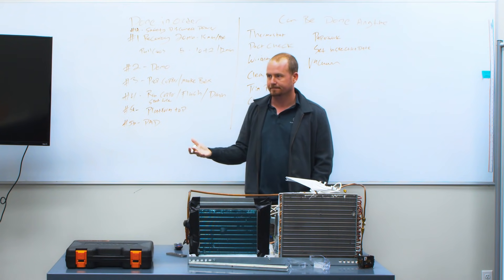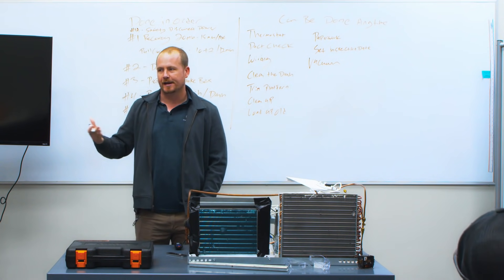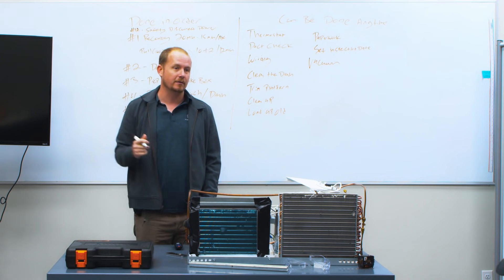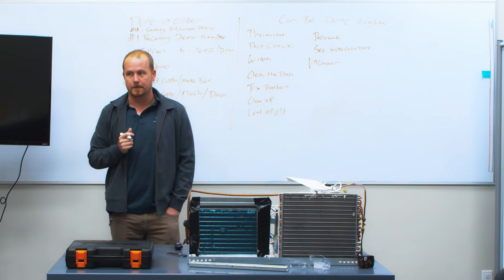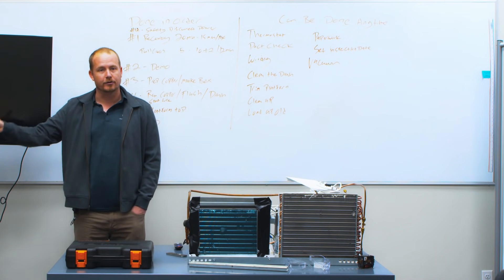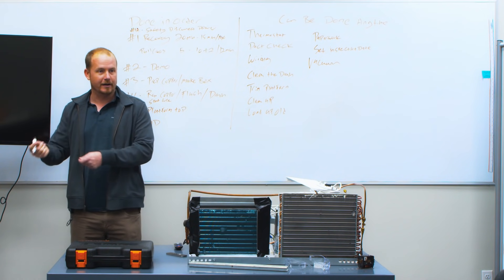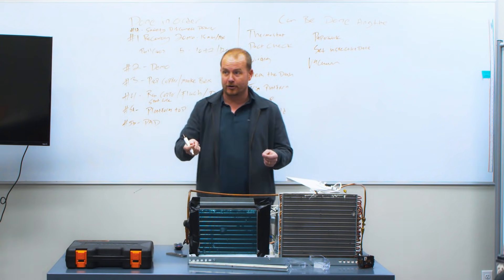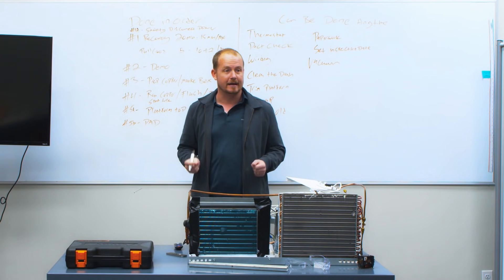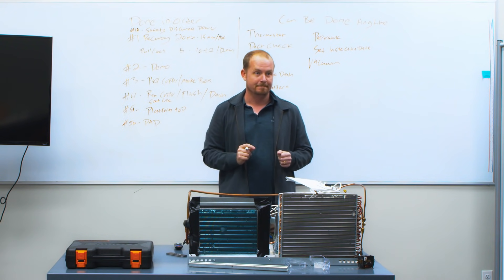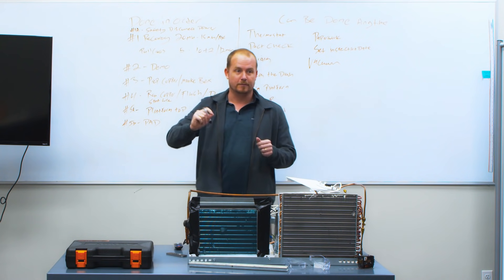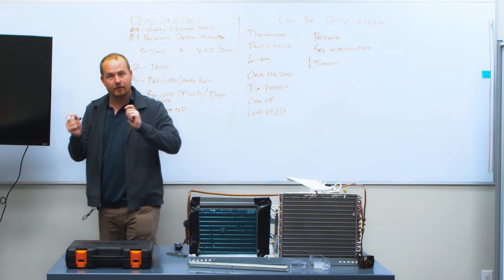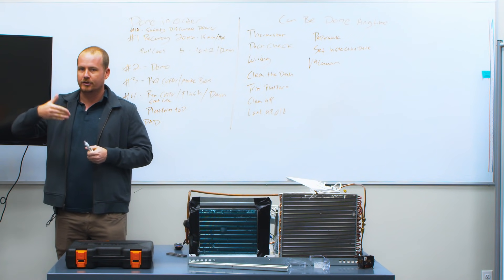If you do the critical path part fast, you can do the final testing more deliberately, which prevents mistakes and even more problems. This is true of almost all core tasks we do — even something as simple as replacing a contactor. There's a specific sequence that if you do it the same way every time, you're much less prone to mistakes. For example, when checking a new capacitor: take out your meter, check it first, make sure it measures properly. Before measuring on a capacitor, make sure it's discharged, then put your meter on the ohm scale and touch the two leads together to confirm they're in good contact, then turn it to the right scale and measure.